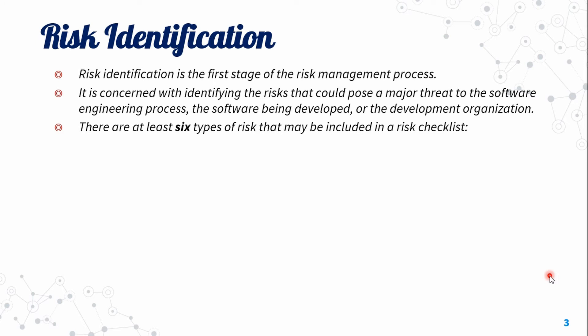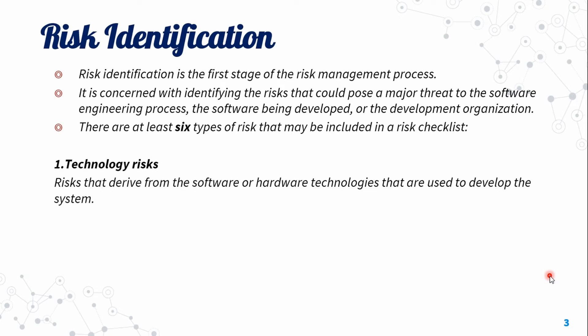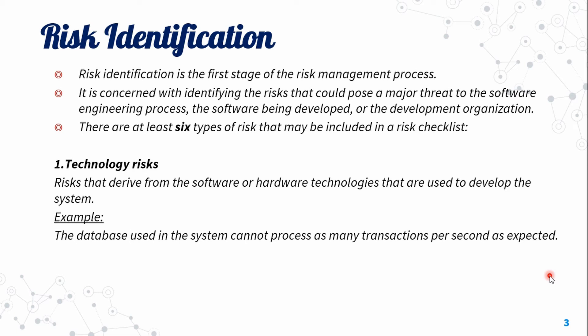There are at least six types of risks that may be included in the risk checklist. The first type is technology risks — risks that derive from the software or hardware technologies used to develop the system. For example, the database used in the system cannot process as many transactions per second as expected.